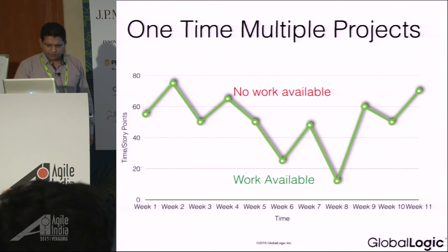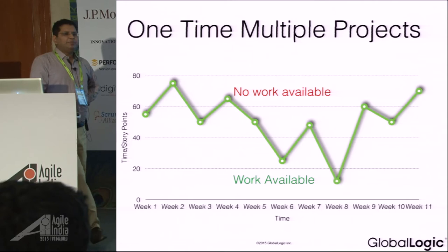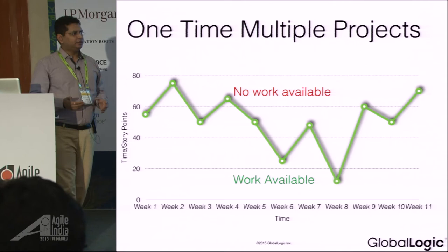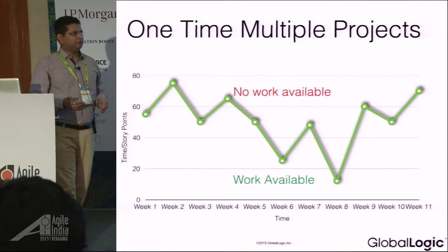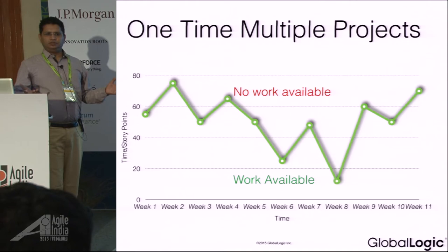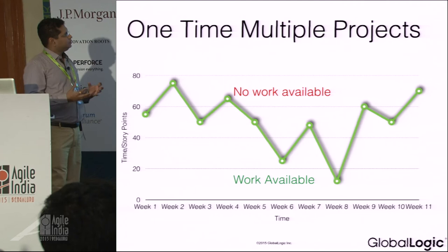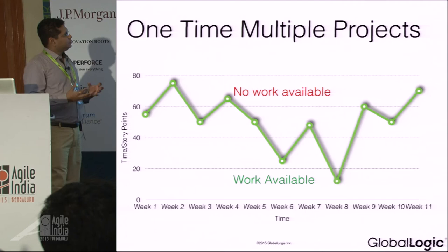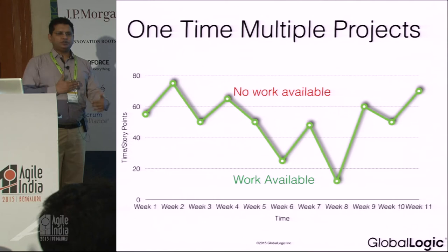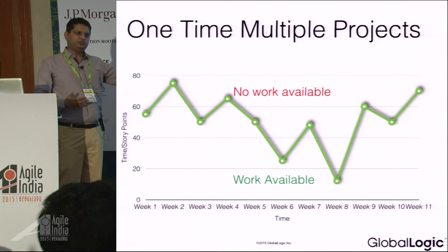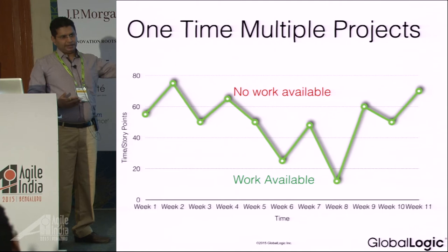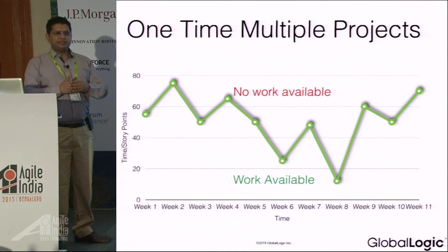The next pattern — one team, multiple projects. This works when, for example, you have a team of five people working in a maintenance mode. Sometimes there is a lot of work, sometimes there isn't. What we did was start doing pairing sessions between team members to make them cross-skilled. When a crunch situation comes in another project, that person can support it. And the customer can decide priority based on business need rather than based on which person is available.